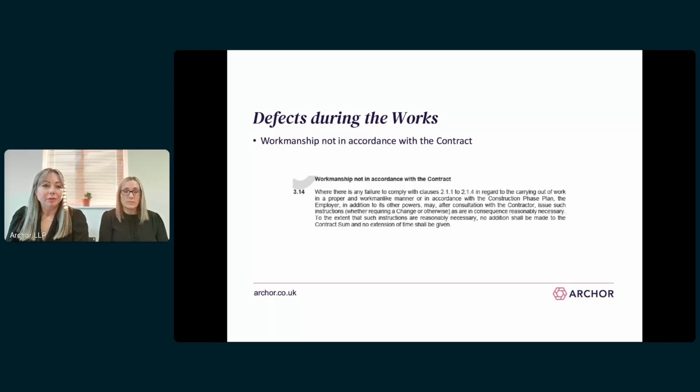So for workmanship not in accordance with the contract, i.e. work not being carried out in a proper and workmanlike manner, the employer can issue instructions to the contractor to sort it out, but the contractor is not entitled to any additional time or money in doing so.